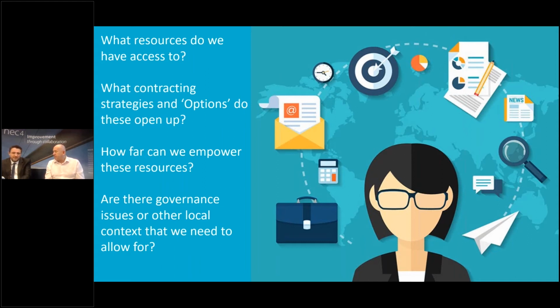But if you're new to NEC as well, knowing things like the whole compensation thing is much more proceed and quote rather than quote and proceed. So if we give an instruction to a subcontractor that changes the subcontract scope, that has immediate effect. It's not something that the subcontractor could wait for. And equally, the contractor's team need to be comfortable with the fact that they are committed to whatever that defined cost impact is going to be, in advance of knowing what it is.